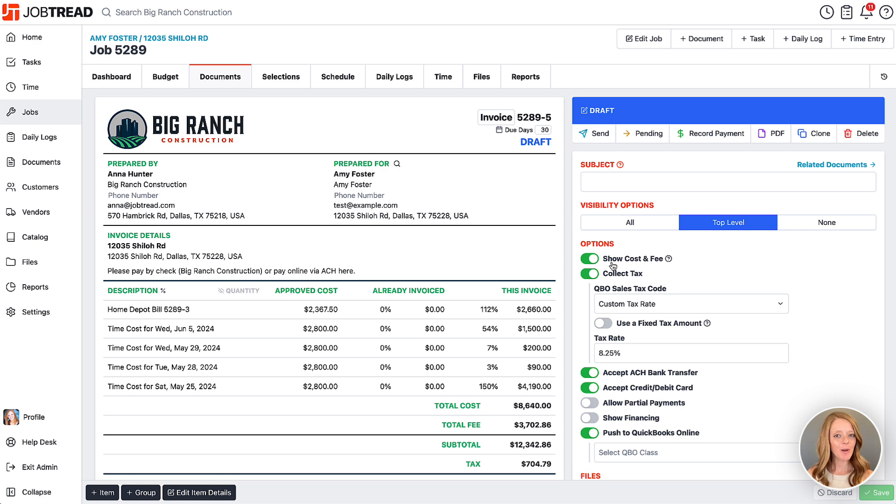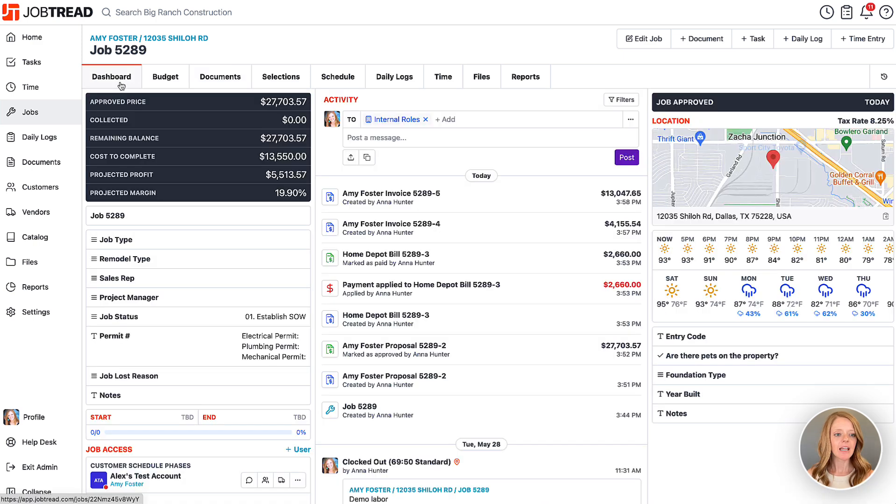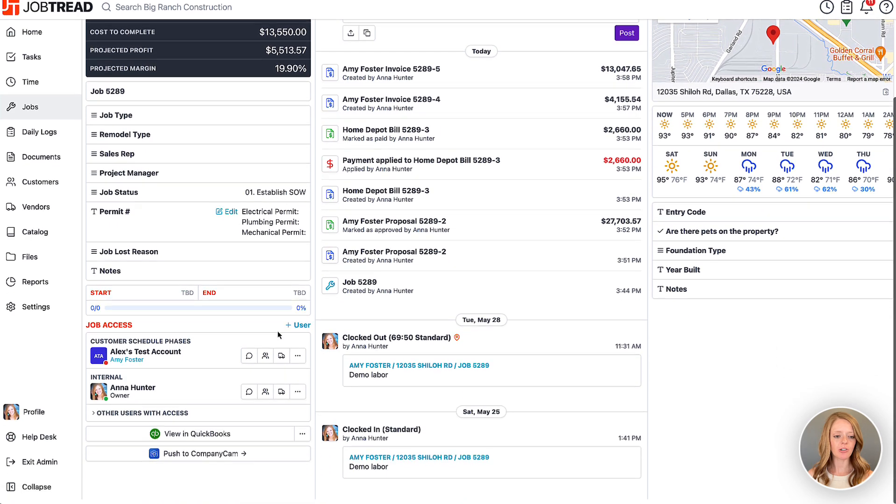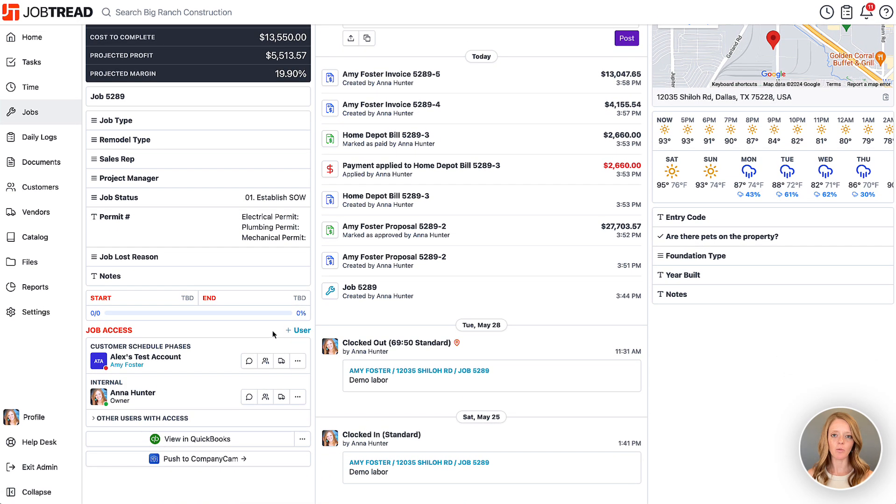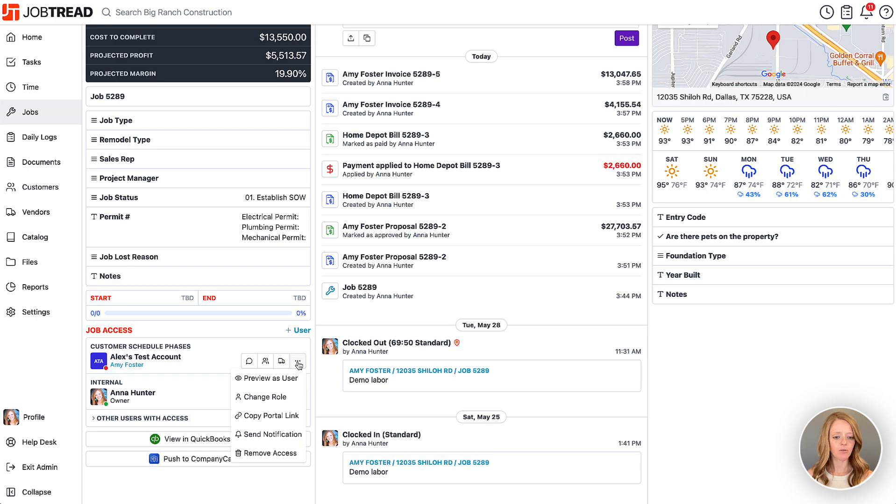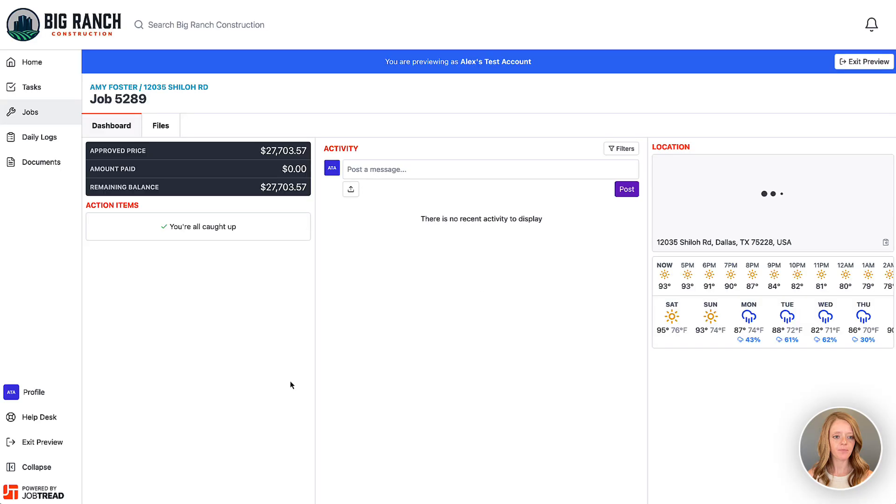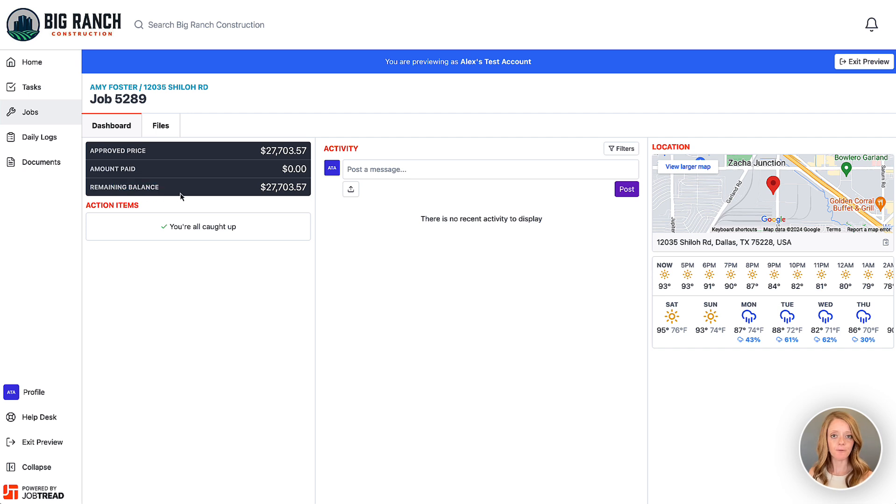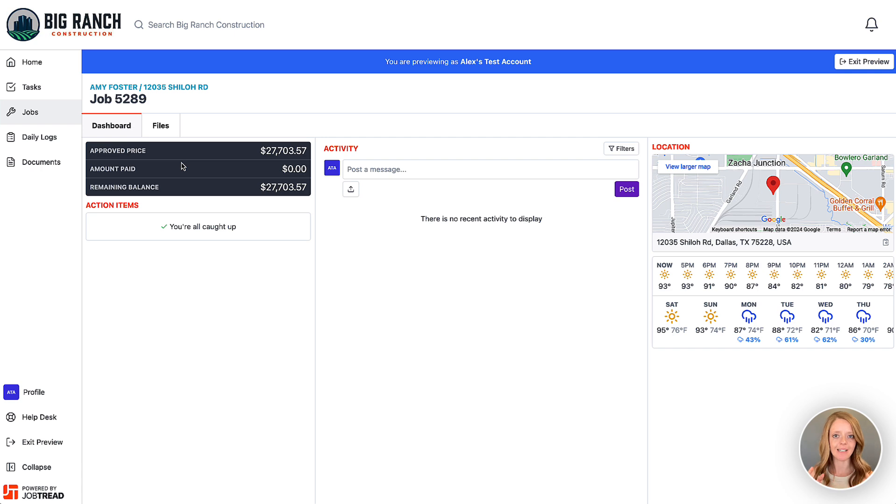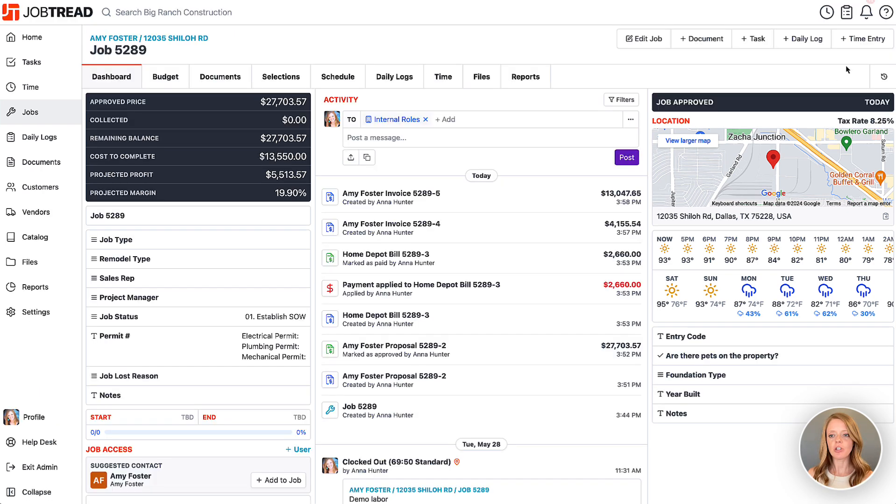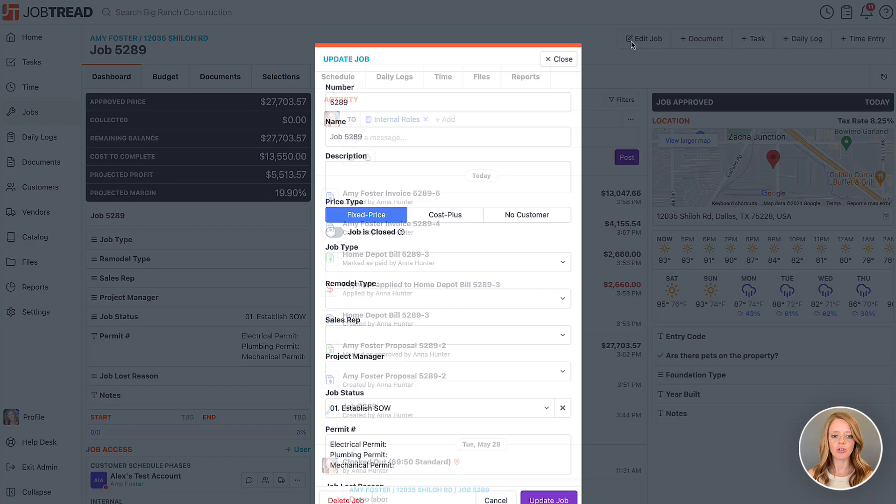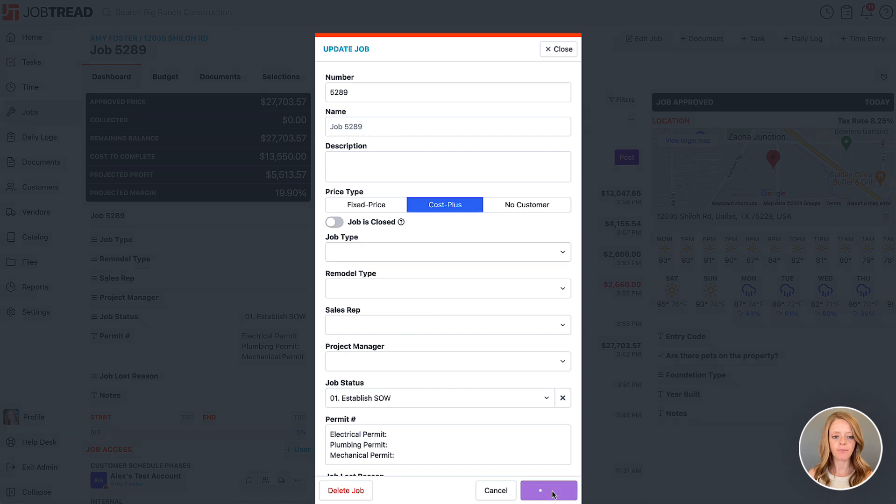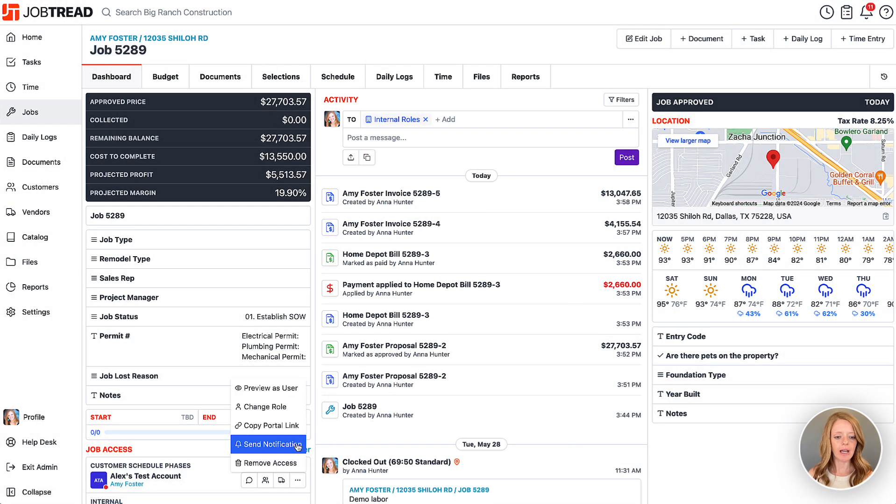Another quick note: if you choose to show the financial summary to your clients, then in their portal they will see different financial summaries based on what type of job it is. Let's take a look at this financial summary right now. Here you'll see the approved price, the amount paid, and the remaining balance. This is a fixed price job, so therefore they're seeing the price which includes the cost of the project and the margin.